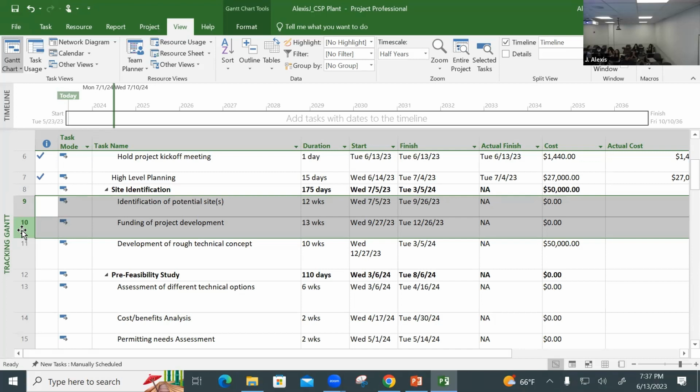Other questions? Right now you are adding work type resources to the activities. Yes. Can you add material type or other things for any activity? Oh yeah, you have to add all your resources. Because you create resources and use them, I added work resources, like the project manager, the project administrators, the civil engineer, but also the materials. I have to add all of them.